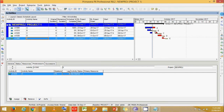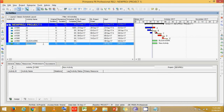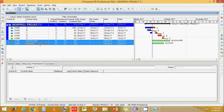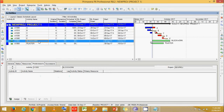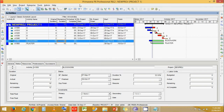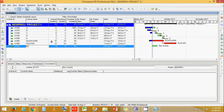How can we solve the out-of-sequence problem? Say we have two activities: Block Work and Plaster. Give Block Work 15 days duration and Plaster 10 days, then link them. If Block Work has already started with 10 days remaining duration and we schedule it, we can see the out-of-sequence issue. This can be solved by changing the activity links — for example, instead of Finish-to-Start we can use a Finish-to-Finish link.